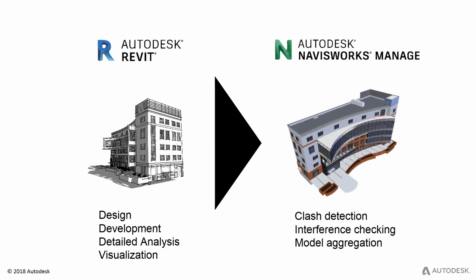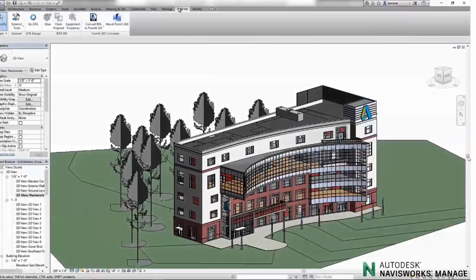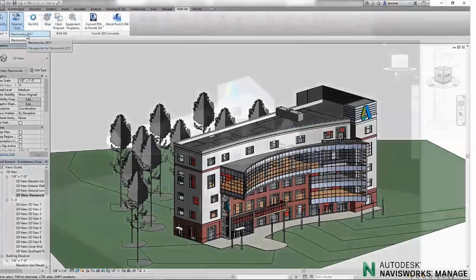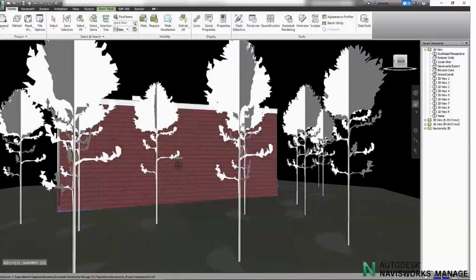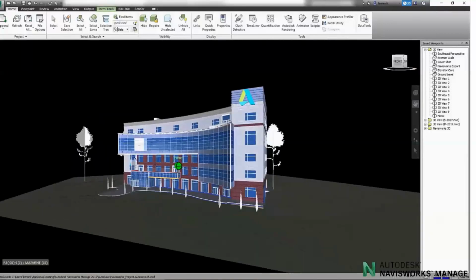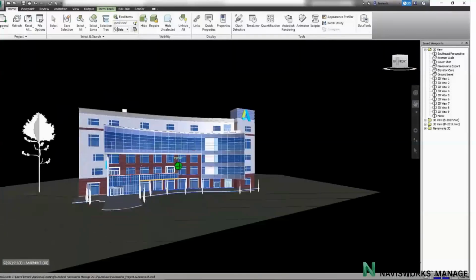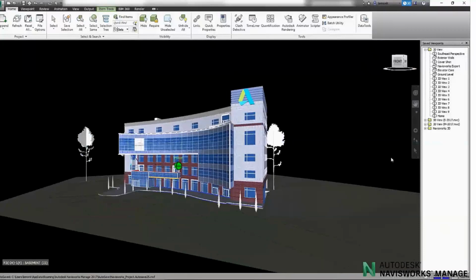So you run them all together and you say, okay, what part of these models are clashing together? And it's telling you clashes that happen before they happen on site, before the team of contractors on site come across issues. You're virtually creating them, and therefore you're eliminating them where it's expensive to rework them, or to solve them at a construction stage.